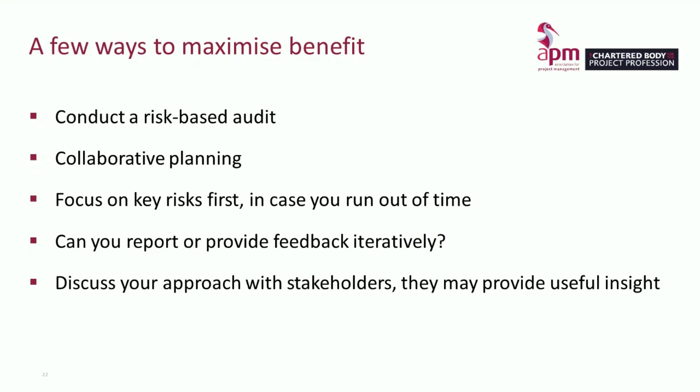So during the planning phase of an audit, we should get input from our stakeholders. They obviously, as the subject matter experts, are useful. Their knowledge and understanding of the risks are invaluable. And we should focus on key risks first. Again, prioritize your scope. Cover the key risks first in case you run out of time. Audits are like projects in that they are generally time boxed. This will ensure the audit provides some value.